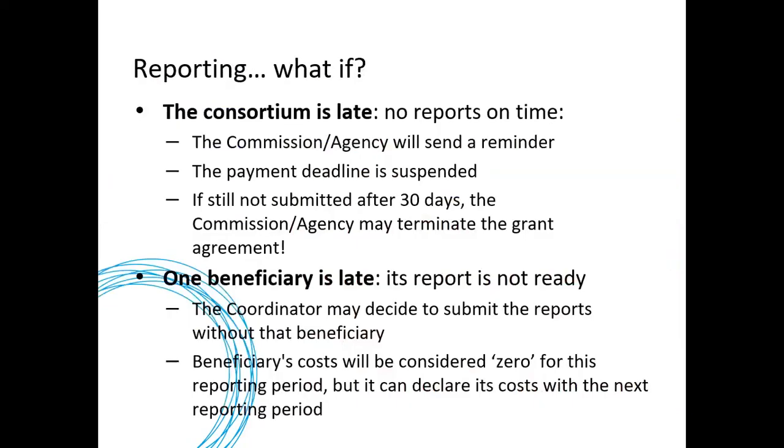So what if the consortium is late and no reports are submitted on time? The Commission will, of course, send you a reminder. The payment deadline is then suspended, and the Commission also has the right to terminate the grant if the reports are not submitted on time.